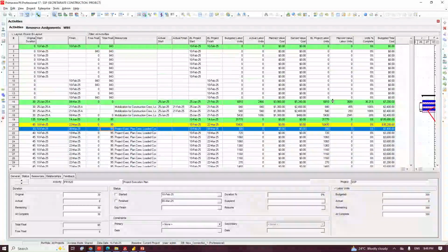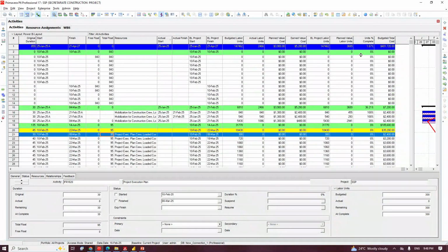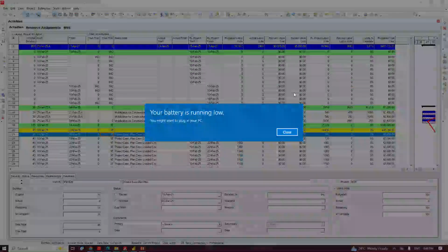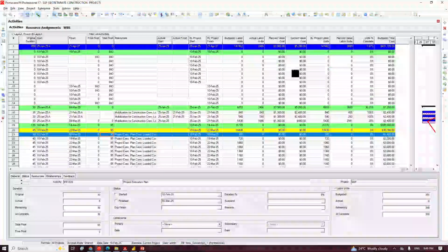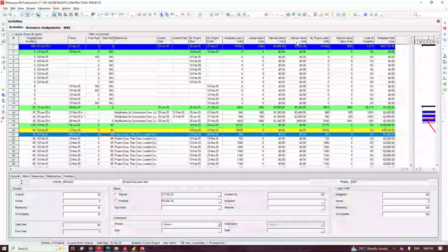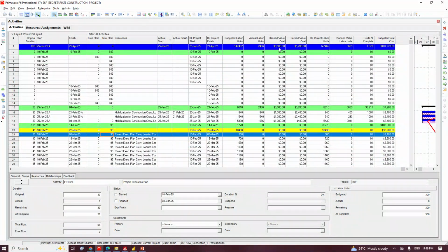So now let's go and check what we have achieved. Watch. The unit percentage is 1.67, right? So it's 1.67. And then when you look at the plan value for cost, this is what we planned. By now we are supposed to achieve $3,900, but we are achieving $5,218, right? This is for cost.